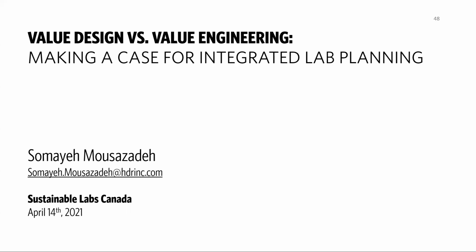In the IPD settings, there are some basic performance goals that are communicated to the team by the owner at the beginning, but also the team goes through a pre-validation process that does a conceptual design against the budget, and then sets some of those target performances together as a team with the owner. And they become these official target performances that the team cannot compromise later on. So it's a very integrated and collaborative way to set those goals.